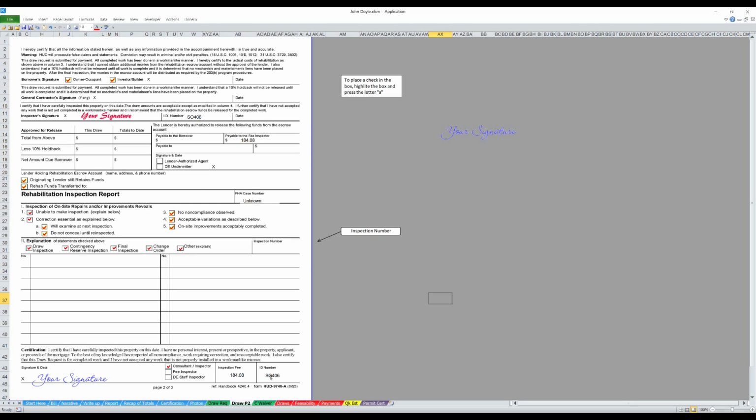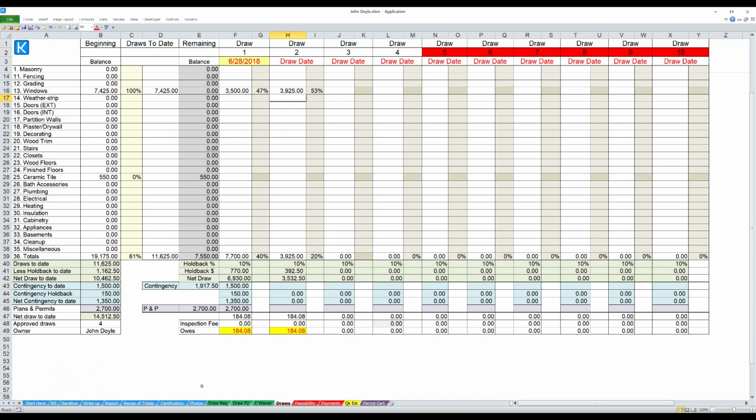And you've got the sheet with you. You've got the contractor's invoice with you. And I would tell them to bring a blank invoice sheet with you. We'll figure it out together. Because if they come out with a pre-made or pre-completed invoice, there's almost always something wrong with it. You can't allow something because it's not done, or it's over, he's charging more than we have in the budget for that item. So tell them to bring a blank one.